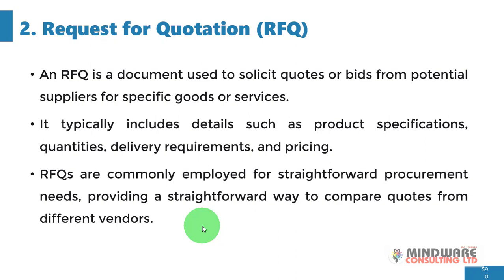So you send requests for quotations to all of the vendors, and then they're going to start bringing in their quotations based on the project requirements, the specifications, as well as the expectations. This will now help you compare the different quotes from the various vendors. You can compare the specifications of the products that they'll be supplying, the requirements, the delivery requirements, and the processes involved.